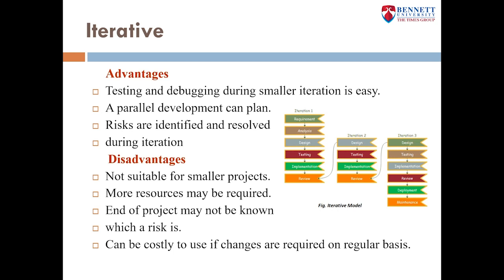Now, moving on to some of its advantages: testing and debugging during small iterations is easy. A parallel development can be planned in the iterative model. It is easy to accept all the ever-changing needs of the project. Risks are identified and resolved during iteration. Limited time is spent on documentation and extra time is spent on designing.